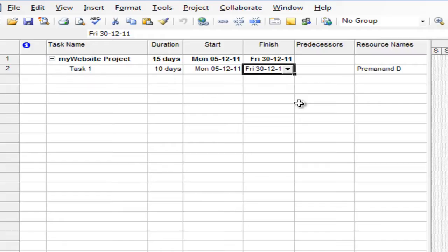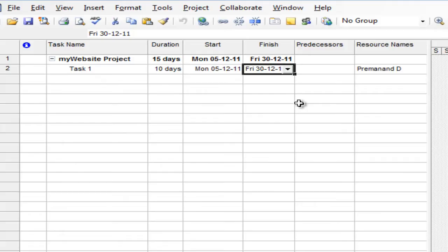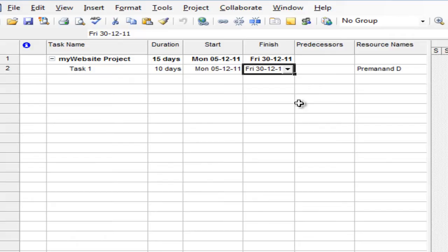Because that week is an off for this resource, the week starting 19th of December. This is how you can set up the resource vacation plans. Appropriately the tool takes care of scheduling and you can report the correct end date of the project to your client and save a lot of issues.